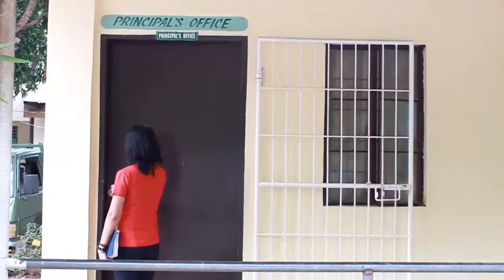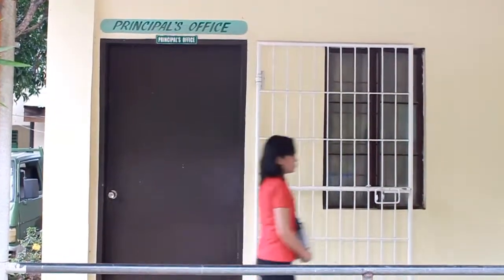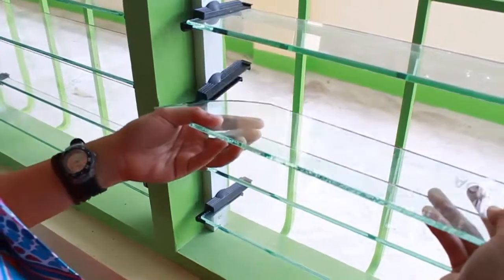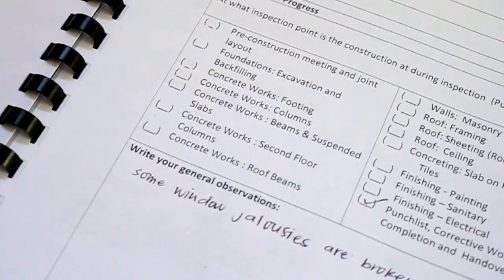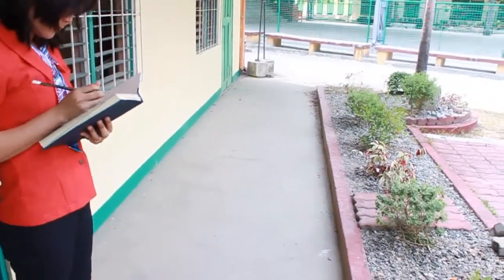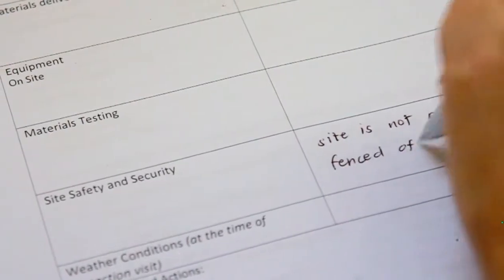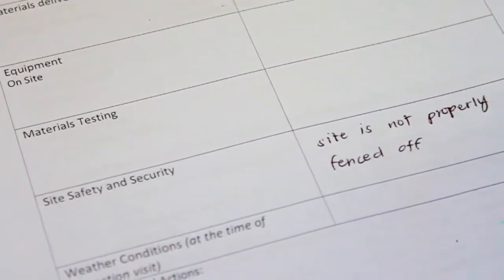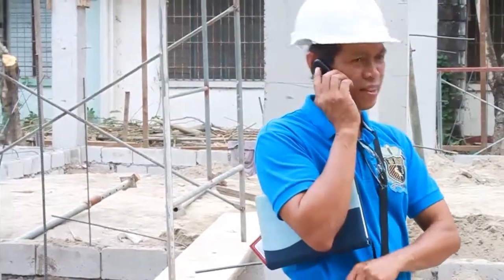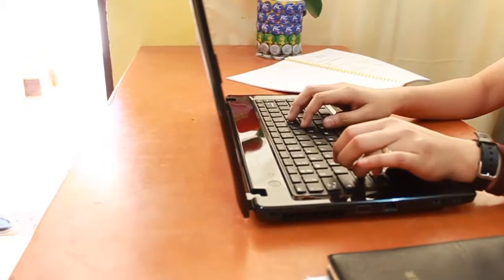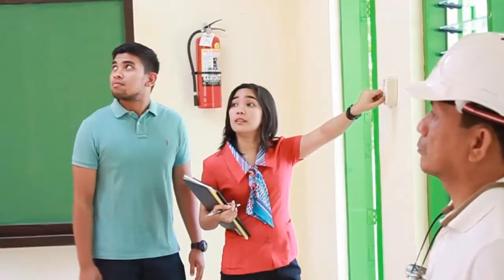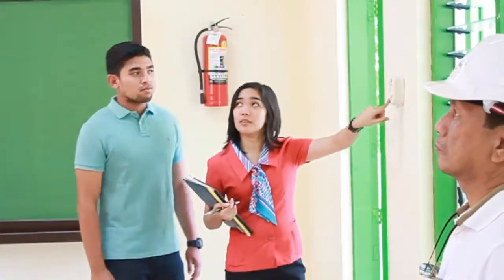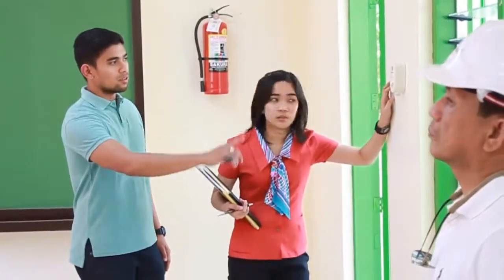The principal should take the inspection logbook to the site at every visit and, when on site, should input or record his or her observations on the ongoing construction activities. If, during an investigation, the principal has recorded in the inspection log any item that requires urgent attention, the principal should inform the DepEd Division Engineer immediately through phone conversation, email, or face-to-face conversation. The principal should also inform the contractor of items which the principal believes is not of satisfactory standard.